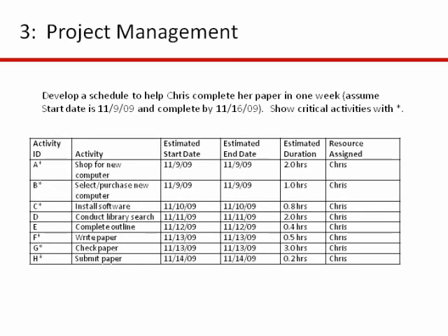Well, I don't have my network drawn here, but for instance, activity B, if you recall, we could do activity B only after we finished activity A. So if we finish activity A on 11/9, let's say in the morning, then we can start activity B on 11/9 in the afternoon. Okay.